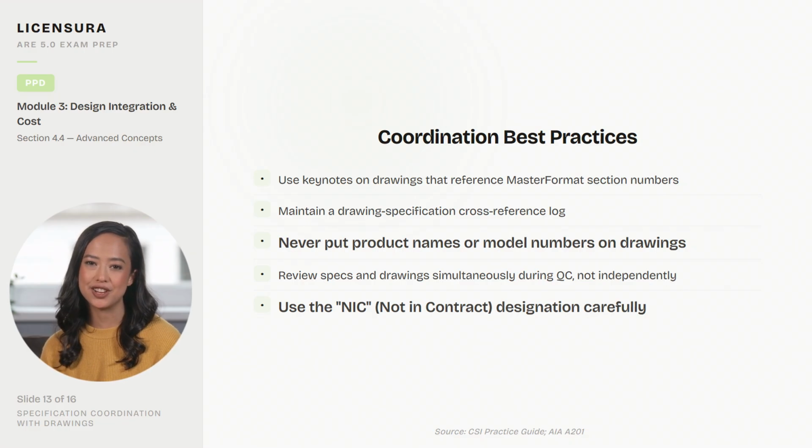Maintain a design decisions log, recording who decided what and when. Get written approval at each phase transition from SD to DD and DD to CD. Use a formal change management process even during design phases, not just during construction. Track consultant hours against fee to identify scope creep early. Include additional services provisions in sub-consultant agreements. Review insurance coverage annually to ensure it matches current project risks.